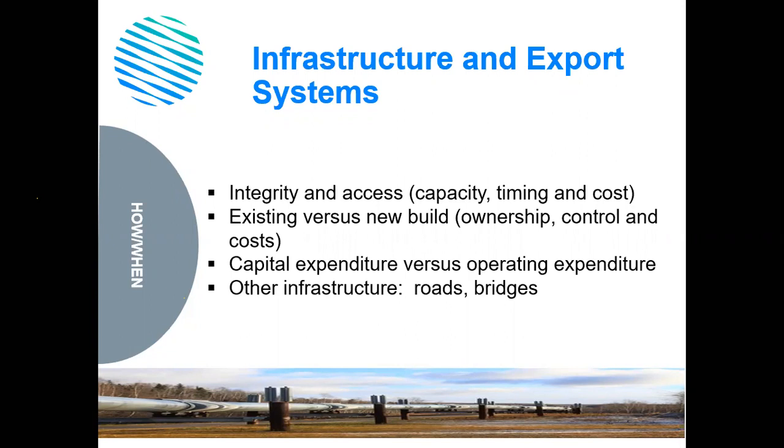So if there is no existing infrastructure close by, you'll need to assess the feasibility, both the technical feasibility and the financial feasibility of building it yourselves. You'll need to bear in mind that you may have to truck production initially before pipeline infrastructure can be built or indeed afforded. That will obviously be costly and may bring operational and HSE issues with it. For example, is the route safe? Can the road and bridges along the route cope with the additional traffic?